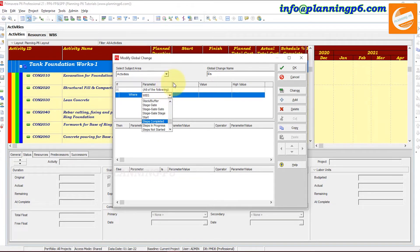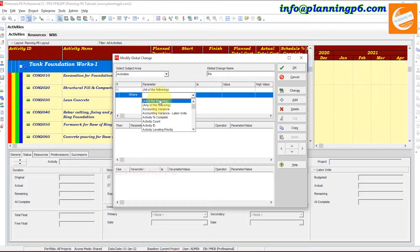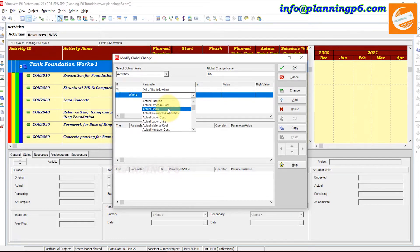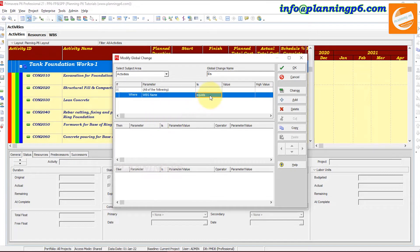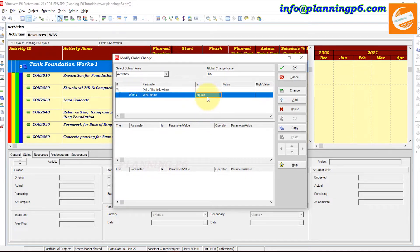You can choose from many fields such as variance, expenses, and more by typing the first word. For WBS Name, you have conditions like: contains, does not contain, ends with, equals, not equal, starts with. We will select 'equals' and enter the value — 'Tank Foundation Works 1'. Note that spacing matters, as seen in the WBS label.